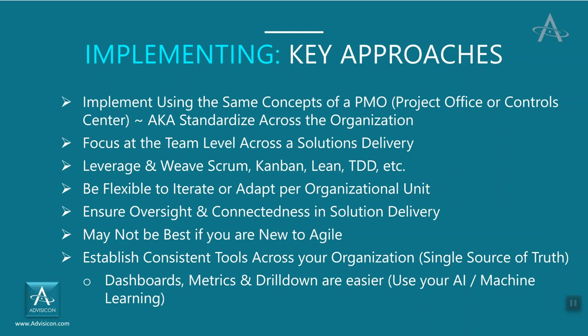So important for people to really recognize the fact that this isn't something that just happens in a vacuum or magically just appears. It's something that you really want to intentionally invest in. And again, if you're new to Agile, I don't recommend jumping into the entire organization. What I would do is begin to implement maybe a pilot. Try some of the pieces out. See how it works. But if you've never seen Agile before in an organization, that is a pretty big uplift to try and jump on.